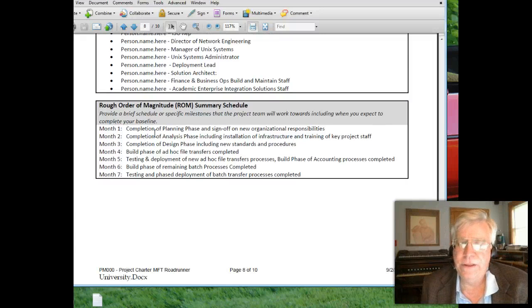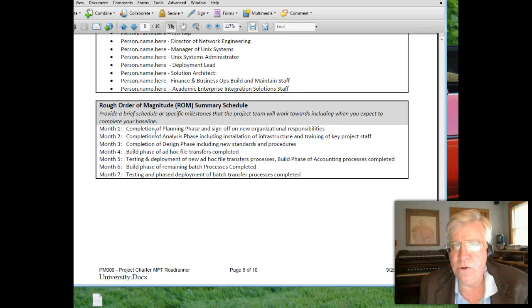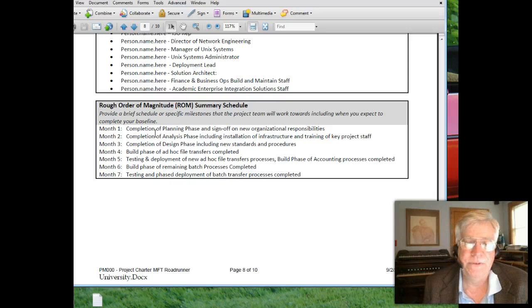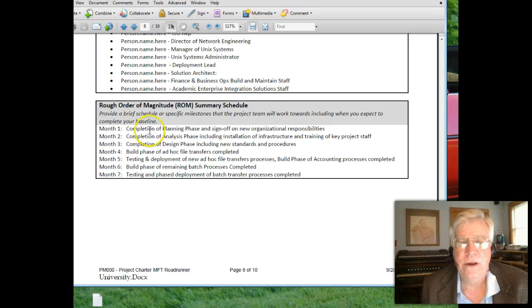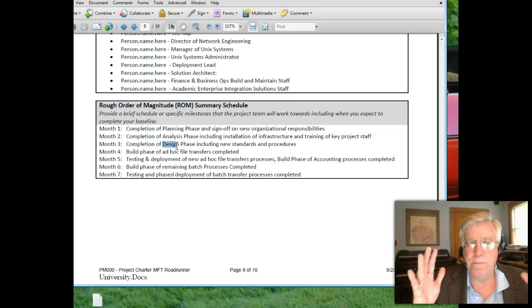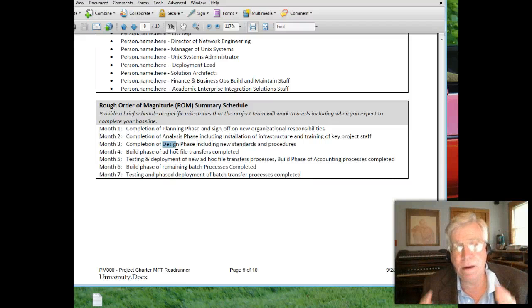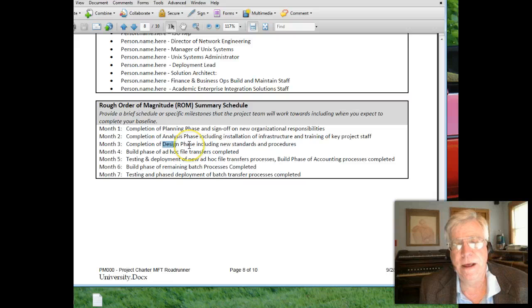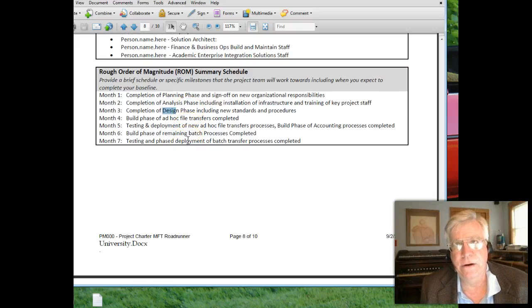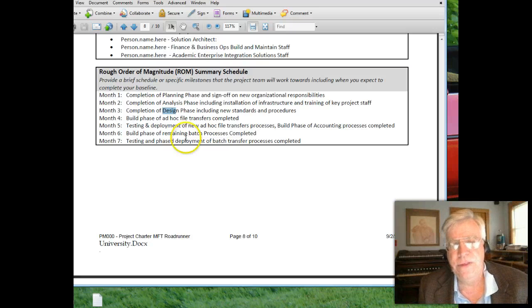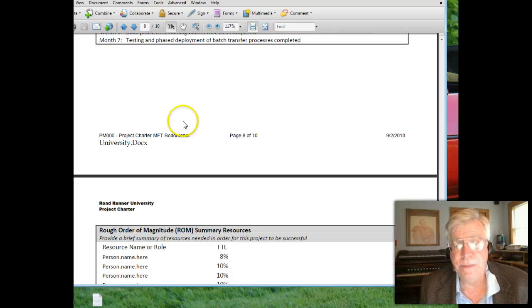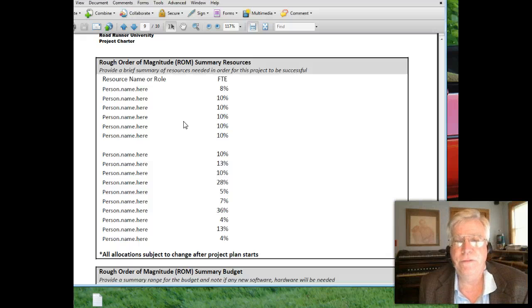Schedule: you might not know what you'll do on any given day at this level, but you're basically saying, 'I plan to accomplish this work in seven months, and here are the phases — planning, analysis, and design.' You define the timeframe — the box — of when you hope to get this done. From there you break it into high-level tasks and areas, and later break the tasks down further when you get into work breakdown structures.